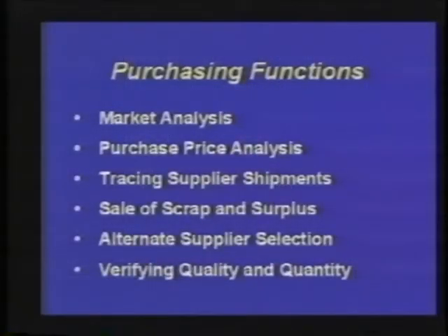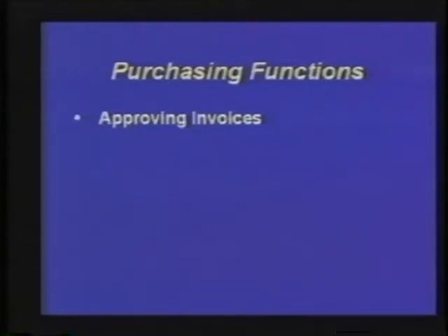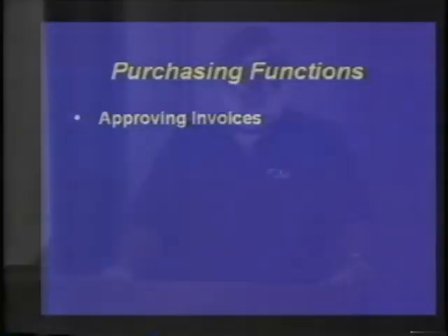We also would approve invoices, and the next two are something that we include in purchasing functions, but they should not be developed by purchasing itself. These should be developed by House Counsel, which establishes penalty clauses, and those generally would be established when you're purchasing new material or you're dealing with a very large project through contractors.